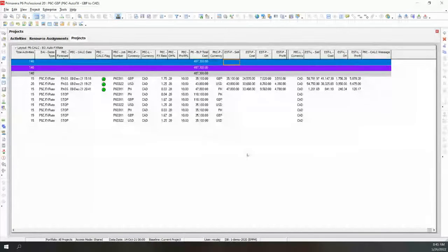We've done many different scenarios. We've got other scenarios where we have clients with joint ventures and they have different working interests or percentages that the different joint venture groups are paying for different components of the project. So, for example, a well project where we've got certain groups paying for the well, certain groups paying for the pipelines, other groups paying for parts of the facility.